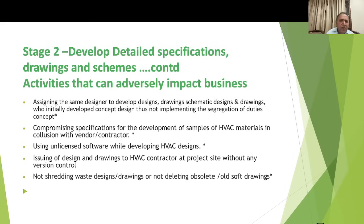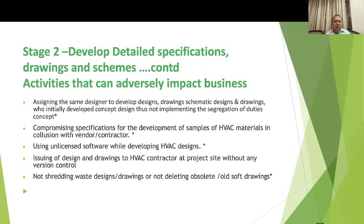Further Stage 2 risks include: assigning the same designer who did the preliminary design to also develop the detailed drawings and scheme drawings, compromising the segregation of duties concept. Also: compromising specifications for development of samples, which is very important for both air conditioning and basement ventilation, using unlicensed software while developing designs, issuing drawings to the contractor without version control, and not deleting obsolete or old soft drawings.